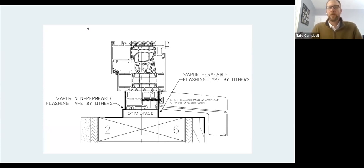It's stuck in this port. Those are things we typically don't see. My recommendation to people, whenever I've tried to talk them into high performance European windows, no matter who your supplier is, I used to always say, on the whole, typically, if a supplier is telling you it's going to be 8 to 10 weeks stuck at the port, that's usually not entirely true. Usually, in usual times, 4 weeks is about appropriate, maybe 5 on the long side. But in these cases right now, especially with the holidays, we saw 7 and 8 weeks for lead time.